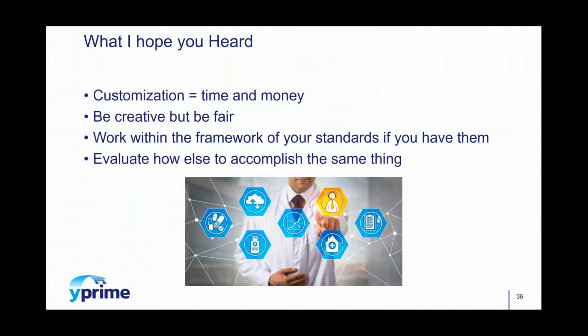So what I hope you've heard today over this presentation is 4 key points. First off, customization equals time and money. There may be times when you need it though. Be creative with what you're trying to develop, but also be fair. If you're asking your IRT providers or any other e-clinical system providers to develop something that's custom, make sure that you understand it's going to take their developers and testers additional time to write custom code. After they take that additional time to write the code, they're going to have to test it. This is all in the spirit of delivering working software.